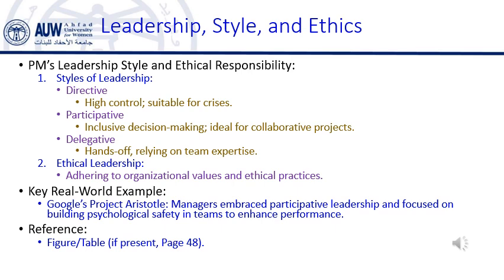Example: if a PM encounters a delay due to a supplier issue, they should inform the client as soon as possible and explain how the delay will impact the timeline. By being transparent, the PM maintains the client's trust, even if the news isn't ideal. This ties into our earlier lessons on stakeholder management and communication. Acting ethically builds strong relationships, helps avoid conflicts, and ensures the project progresses smoothly.